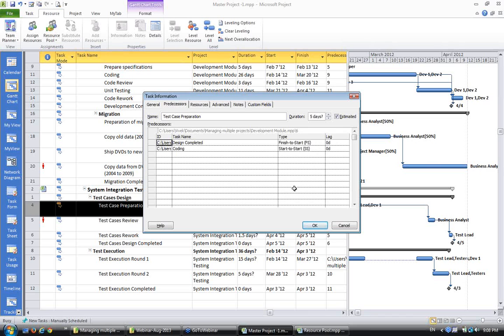And the second thing is that if one person does not have access to any other project plan, or some other resource pool, it will create the problem. So you need to make sure that you are maintaining a common directory at one place, which whomsoever wants to participate in this exercise, the project managers, the resource manager and other team members, or whomsoever is making modification and using it, must have access, and the read-write access.